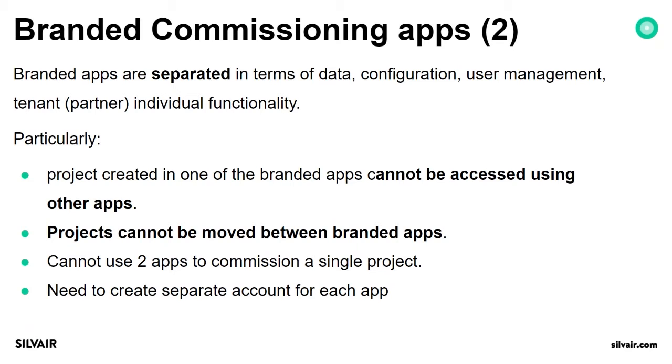So you also cannot use two different mobile applications to commission a single project. If the project was created in the Silvair web application, you will need to use the Silvair mobile application to commission devices in such a project.